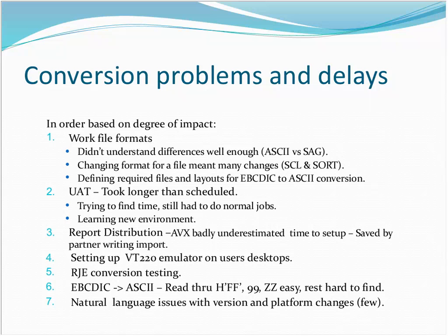And I'm like, oh, yeah. So she says, well, I'm going to call a couple just to confirm that everybody's good to go. Well, she calls them and we find out, well, I didn't really know what that email meant, so I just ignored it, or I didn't understand it. I just deleted it, or, oh, was I really supposed to do something? So about a week and a half or 2 weeks before we go live, we realized that about half of our external people couldn't get to the system when we go live. So that was a big ouch.